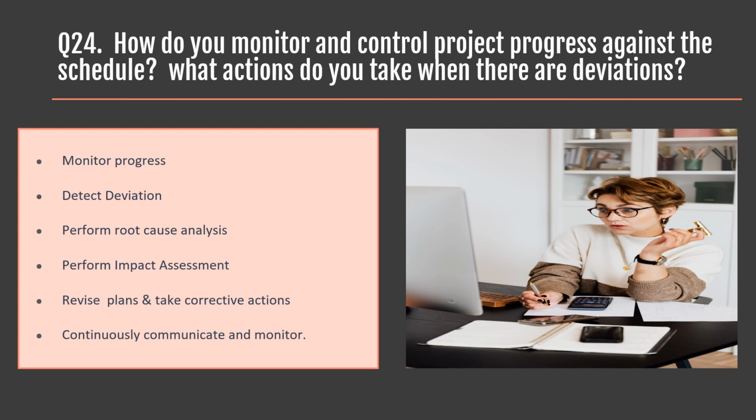at risk. Mary worked with the design team to expedite the UI design process by allocating more resources to focus on critical design elements. The project schedule was also adjusted accordingly. She also communicated about the delay in UI design and the actions taken to Jane, the restaurant owner.